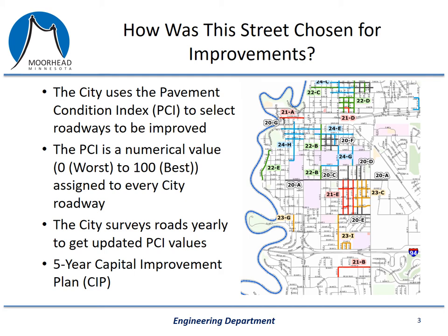For our street projects, we look five years ahead. Right now, if you go to the city's website, you can view our five-year CIP plan and see all the street improvement projects we are proposing to do for the next five years. We use our pavement management software, which takes into consideration the PCI value and our proposed budget for each year, to develop a five-year plan. It tells us which streets we should do and how to get the most out of our tax dollars.